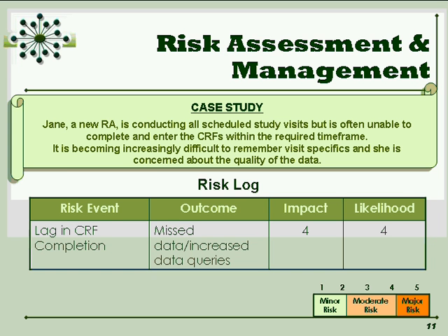What's the risk of that? And as we have noted here, the event itself would be the lag in CRF completion. And the outcome of that event was that we missed data and there were increased data queries. In regards to impact, as the data workload mounts and the specifics of the various interviews become increasingly fuzzy, there is a concern for the quality of the data.